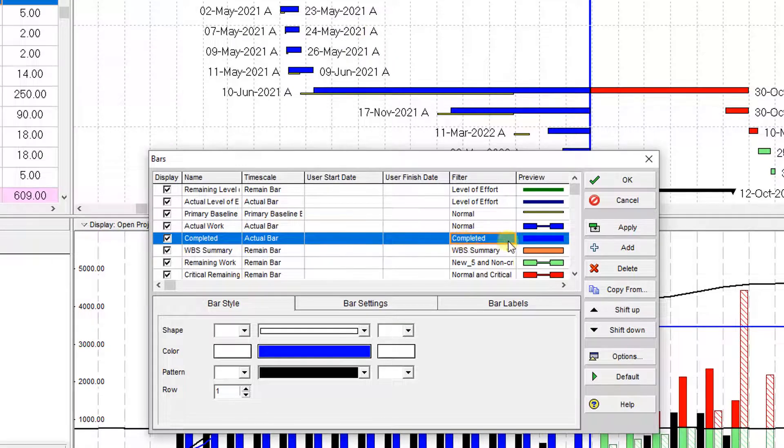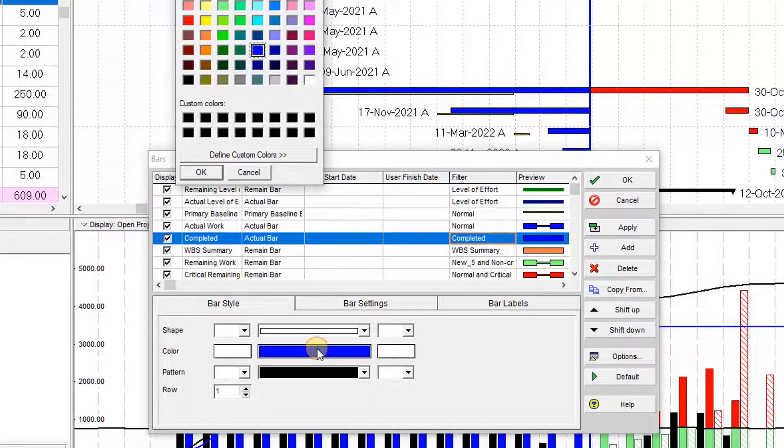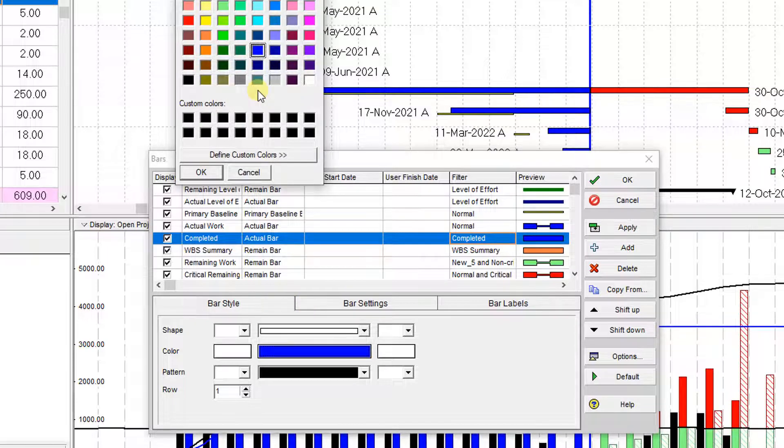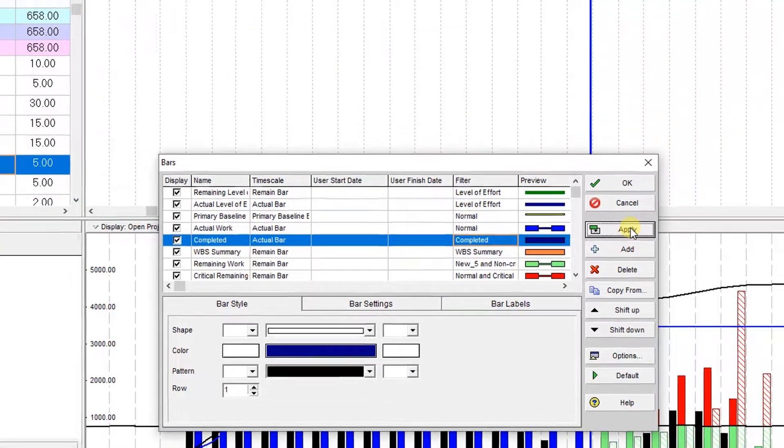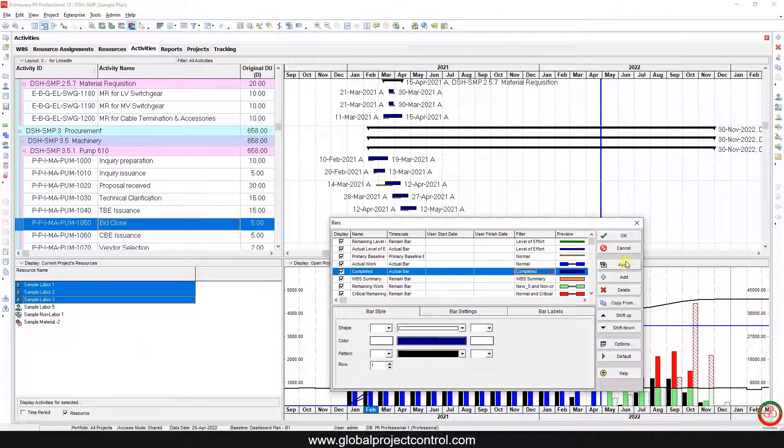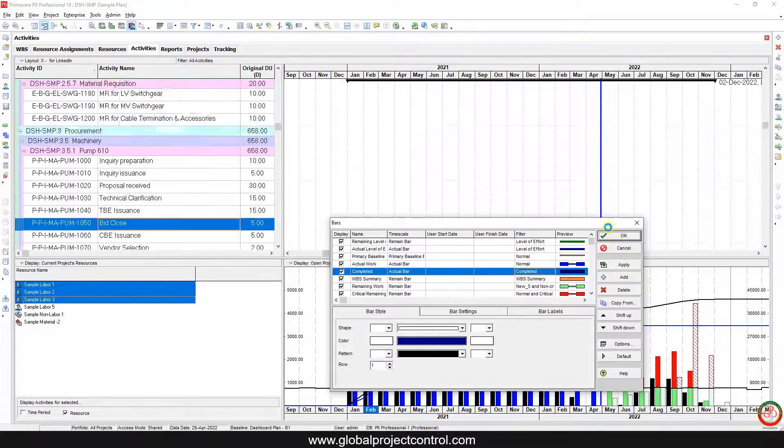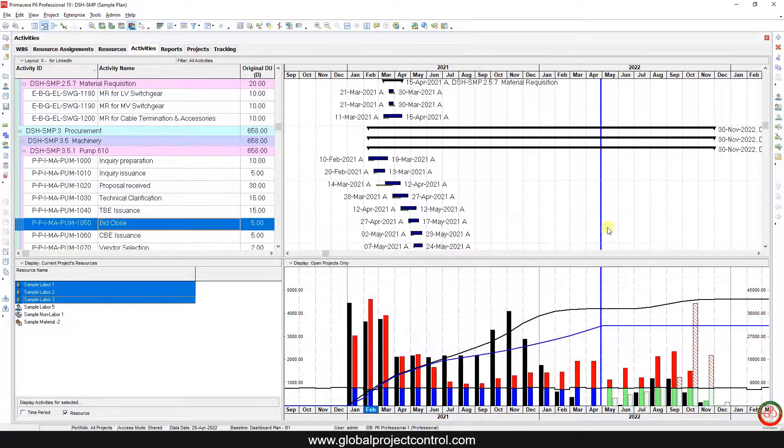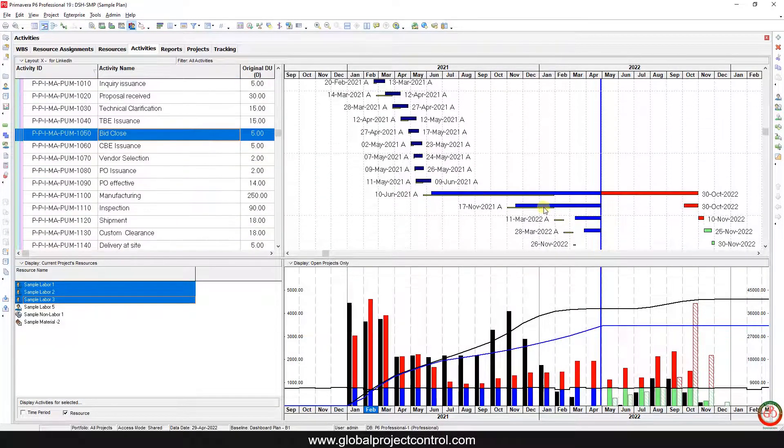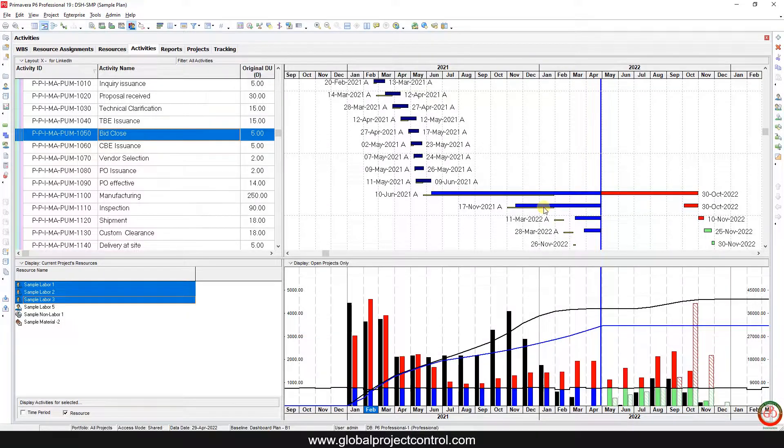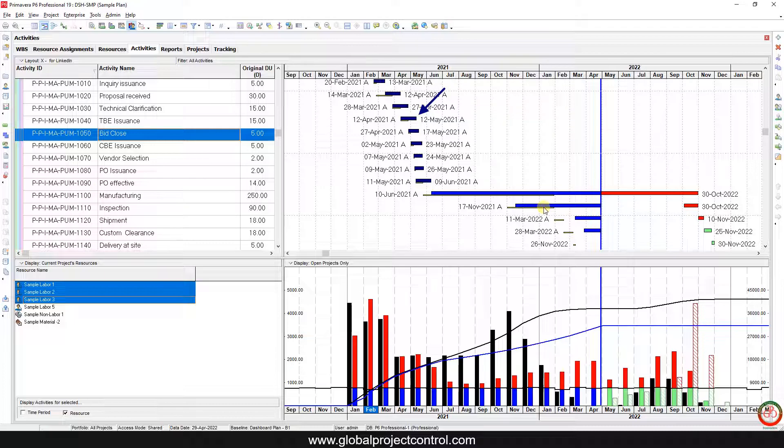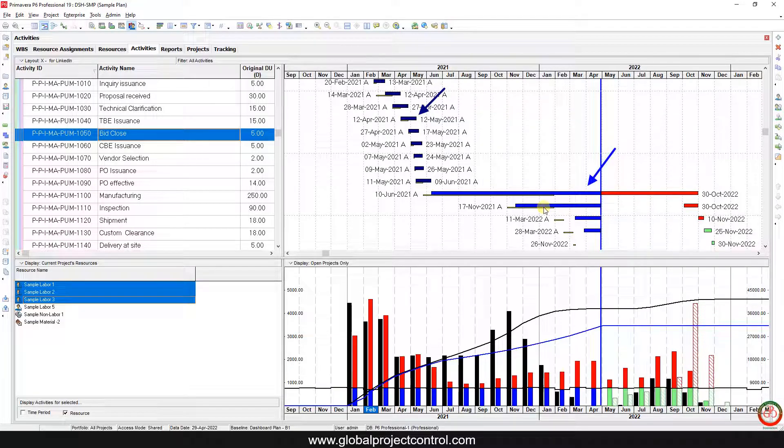But for the color, you need to choose it based on the available ones, or you can create your own. I assign this color to the completed one and apply it. Now if I scroll it down, you can find that my completed activities are almost black, but the in-progress activities are blue.